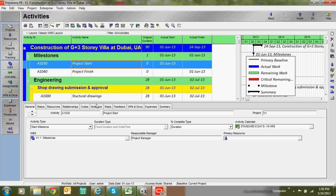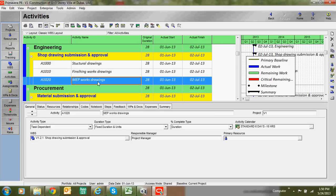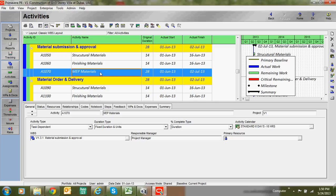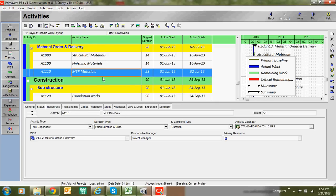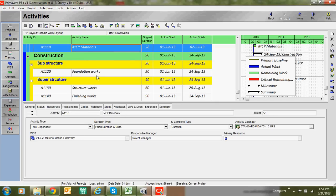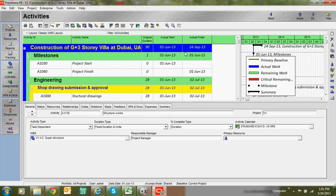We have now created activities under WPS and assigned their durations. In the next class we will see briefly how to add columns and how to add links between activities. Currently there are no links between activities. Once we add links, we can get an accurate completion date and total project duration.